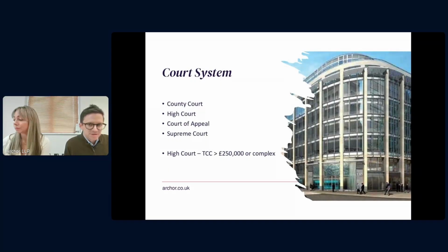Okay, so the slide shows the structure of the English civil court system, which is generally where most construction cases are dealt with. Occasionally there'll be a criminal aspect to a case, so for example health and safety breaches, but for the most part almost everything that we do is dealt with by the civil court system. High value and technical construction disputes are usually dealt with in the Technology and Construction Court, which is a division of the High Court. We're really lucky in this jurisdiction that we've got a specialist court that's dedicated to construction and technology disputes.